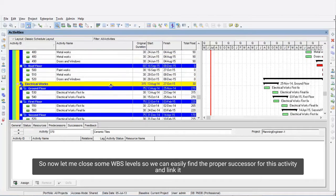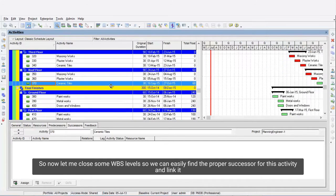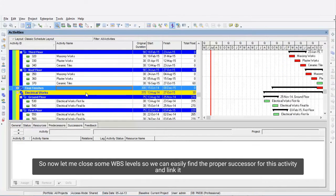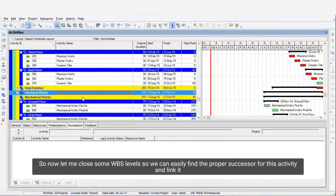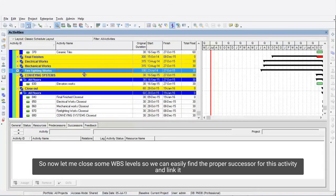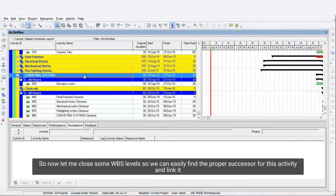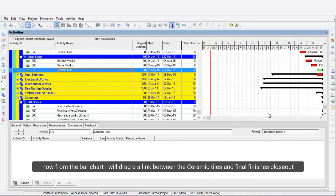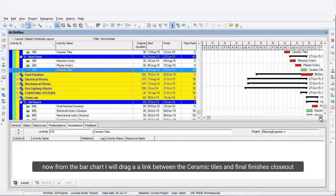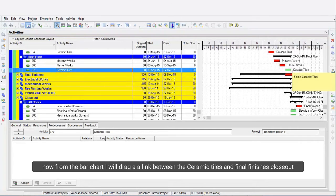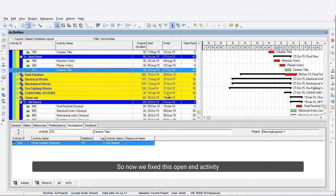Now let me close some WBS levels so we can easily find the proper successor for this activity and link it. From the bar chart I will drag a link between the Ceramic Tiles and Final Finishes Closeout. Now we've fixed this open-end activity.